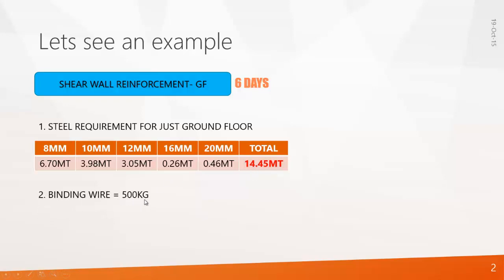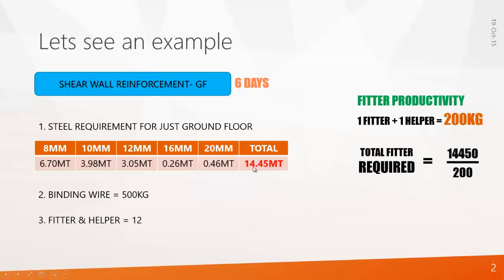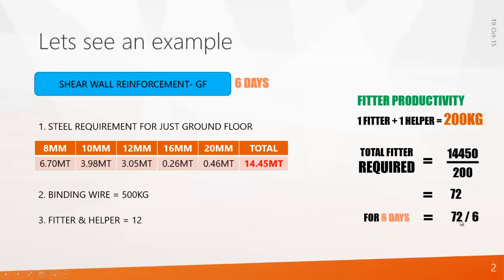I arrived at this calculation based on productivity, and we require 12 fitter and helper. It's based on productivity: 1 fitter and 1 helper can give an output of 200 kg per day. So to perform 14.45 metric ton of steel, we require 14,450 kg divided by 200, that gives you 72 fitter and 12 helper per day. So for 6 days, we require 72 divided by 6, that makes 12 fitter and 12 helper. So this is the calculation.